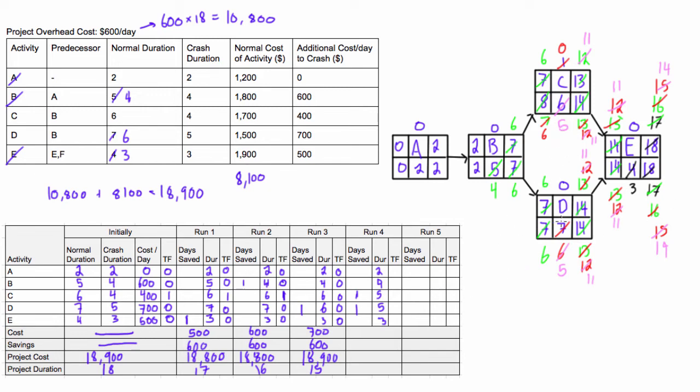Okay. So looking at that, our critical path, 0, 0, 11, 0, 11 minus 11, 0. Everything is 0. Everything is still critical. So we can go down here just to keep tabs on that total float. Everything is 0.